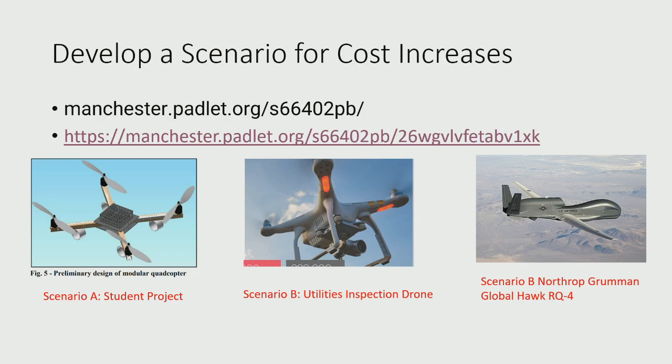There is this thing called scope creep, where people start to add little incremental "it'd be nice if this would happen" requests, but under the radar, it's not being monitored or validated by any management system. I've seen this in software where someone says, can you just put a button here, which gives us access to this information, and it could take a programmer the best part of 6 months to do something which on the surface looks very simple, but incurs a lot of cost.